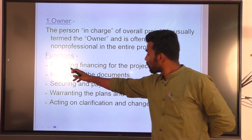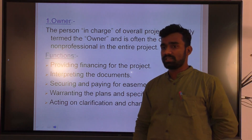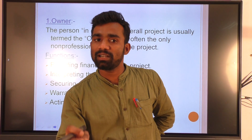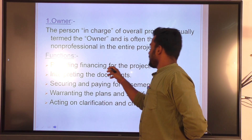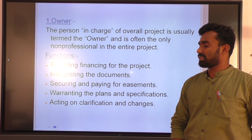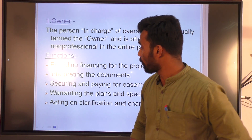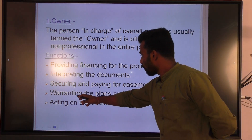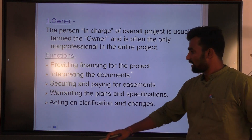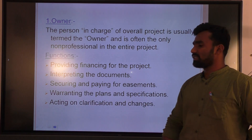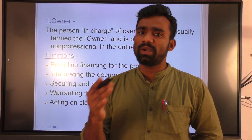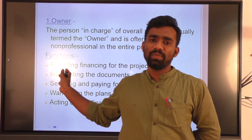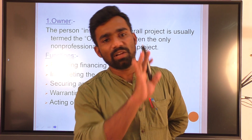The functions of the owner include: providing finances for the project — if I am going to construct a building, I will pay for it and provide the budget. They are also responsible for interacting with documents, securing or paying for easements, warranting the plans and specifications, and acting on clarifications and changes. If the government wants some clarification, they can discuss with the engineer or contractor.